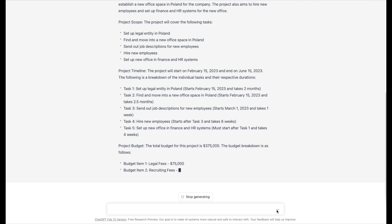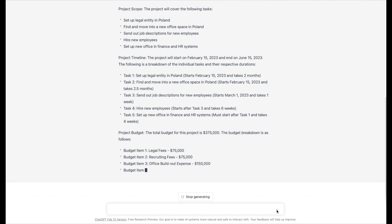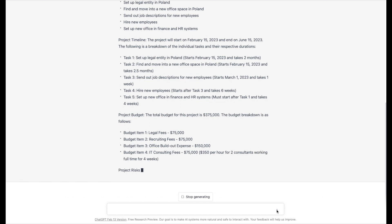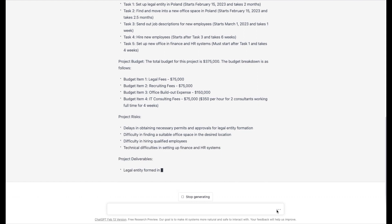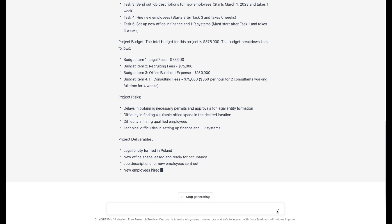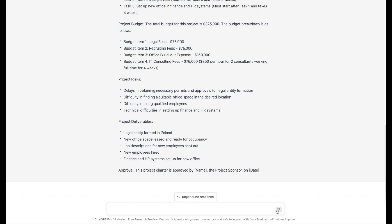It is putting in most of the elements — budget, timeline, scope. It put in the budget fees, but it continues to get the math wrong on that. It inserted some project risks, which is great — difficulty in finding suitable office space, delays in obtaining necessary permits. It has an 'approved by' section too. It included a lot of the key project charter elements. It doesn't have a list of key stakeholders and executive sponsors, but I didn't give it that information. Given that this is just a publicly available tool, that's a really quite remarkable finding and I'm very pleased with the results.